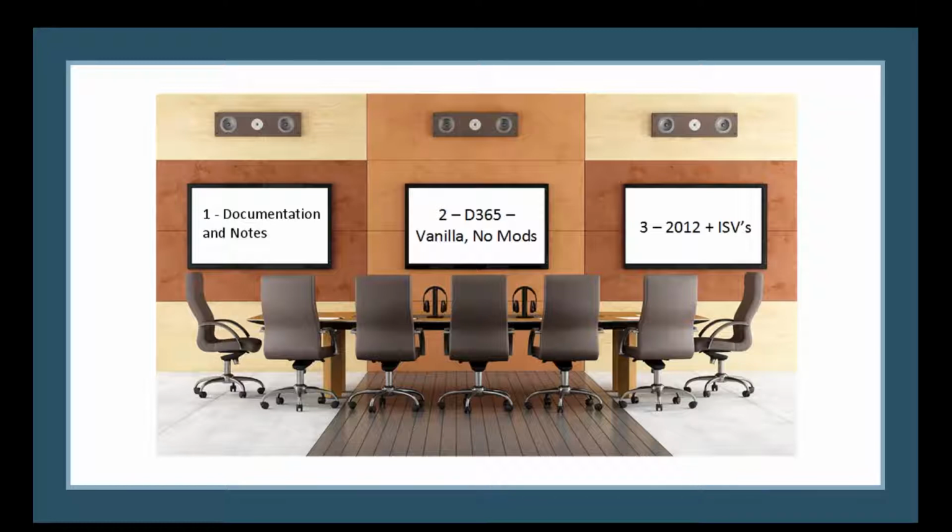We understand that. But what we try to do is go through the process in 2012, and then we try to reflect it inside of D365, right? That really identifies where those gaps are. And that pre-work that you do helps you identify the level of effort and scope required for your upgrade process, and what path to go down.